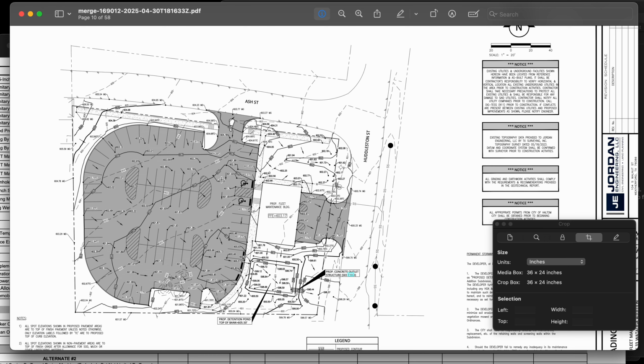So that is why I'm not a big fan of including it'll be 567 cubic yards of cut, it'll be 1,742 cubic yards of fill, and this is your price to import, and this is your price to export. I'm not a big fan of that. What I like to do is include the export of soils as a separate and alternative line item.